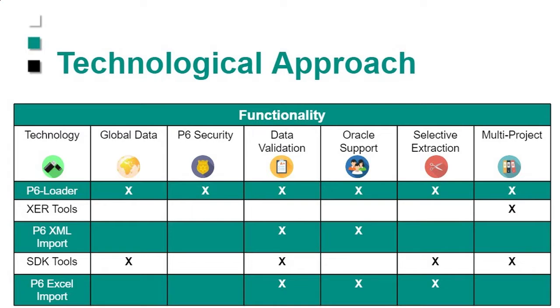They started getting an error message whenever anybody tried to log in. It took us a while, but we eventually tracked it down to someone had manipulated an XER and, trying to be helpful, had taken an EPS level activity code and changed it to a global level activity code in the XER file, but they spelt the word global incorrectly. So when P6 tried to read the activity dictionary, it came across a value it didn't know what to do with, and it just crashed.